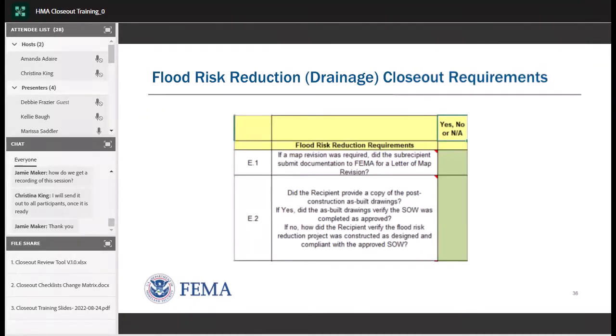Now Marissa will discuss flood risk reduction or drainage closeout requirements — questions E1 through E4 of the new checklist. E1 assesses if a map provision was required and whether documentation was submitted to FEMA for a Letter of Map Provision, also known as a LOMAP. E2 assesses if as-built drawings were provided and if documentation was submitted to verify project conformance with the approved scope of work.